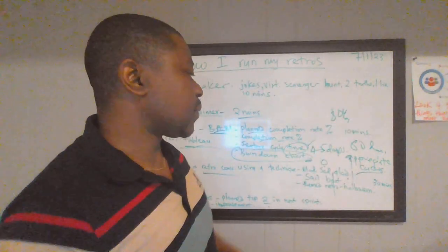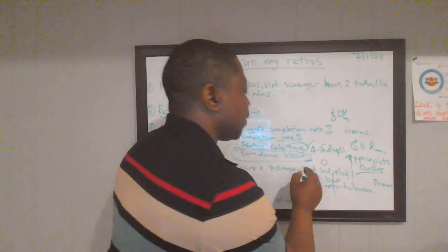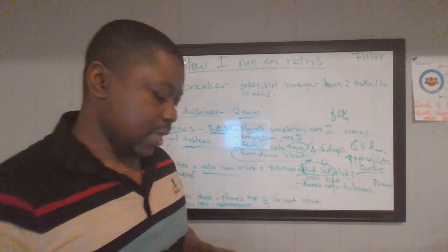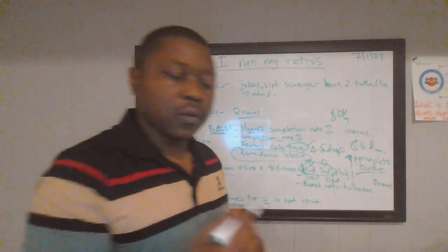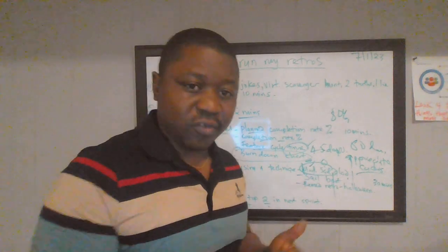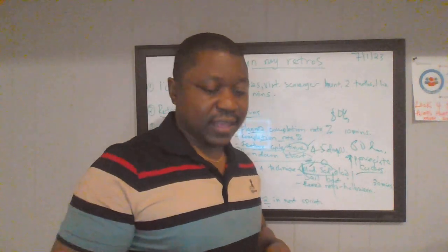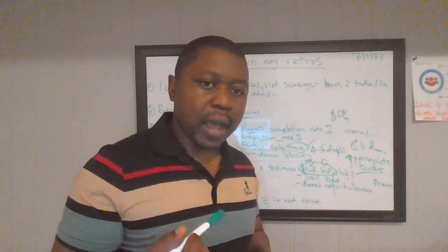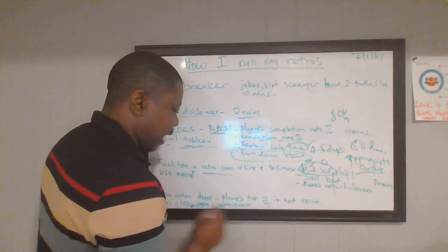Then at the end of the 30 minutes, we zero in on the Mad and Sad columns and say, hey, what can we do better to improve on the process, for example? What can we do better to improve on the tool? Is this tool not working? What other tools are out there, for example? So it all depends on what is under the Mad and the Sad columns. Then once we capture all those improvement action items, we create in Jira an issue and give it an issue type of improvement, and then we prioritize that in the product backlog.